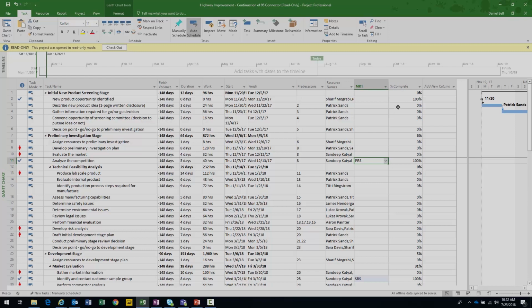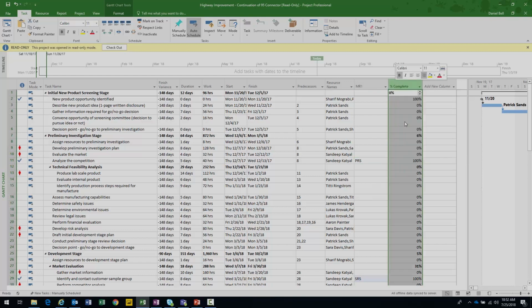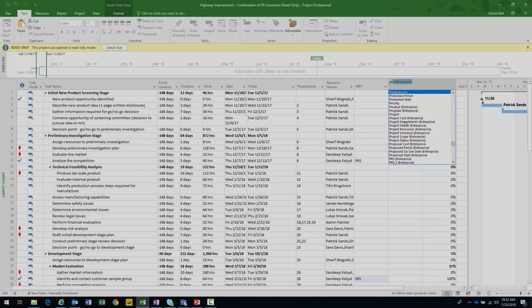Now, there are other fields required in the system to make these calculations show up at the project level. First of all, since it's a task level field, you need to have a task level formula to evaluate what's going on here. If I right click here and say insert and type PR, it's going to bring me to the fields that begin with PR. And notice there are 2 PRS fields. One has an underscore T appended to the end. The underscore T just represents that it's a task level field. It makes it easier for me or whoever's maintaining the system to find it.